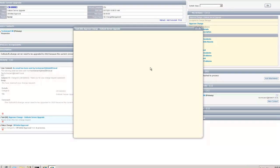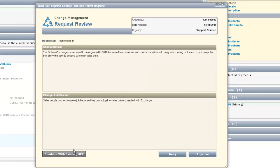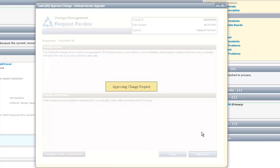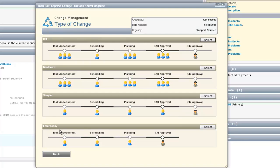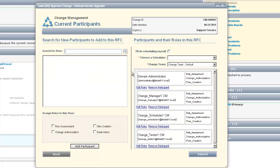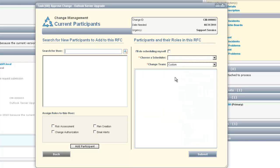First we click Approve Change. This brings up a window where we can review the change details and justification. The change manager will then select to approve the change after reading through all of that information. They then choose what type of change to make: ITIL, moderate, simple, or emergency. For this circumstance we're going to use the ITIL method. These options are all based upon how many people can be involved in the change and how they can be involved.